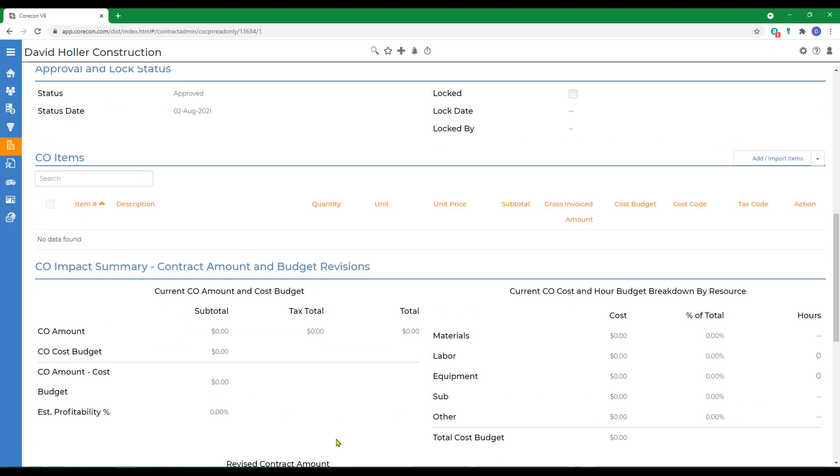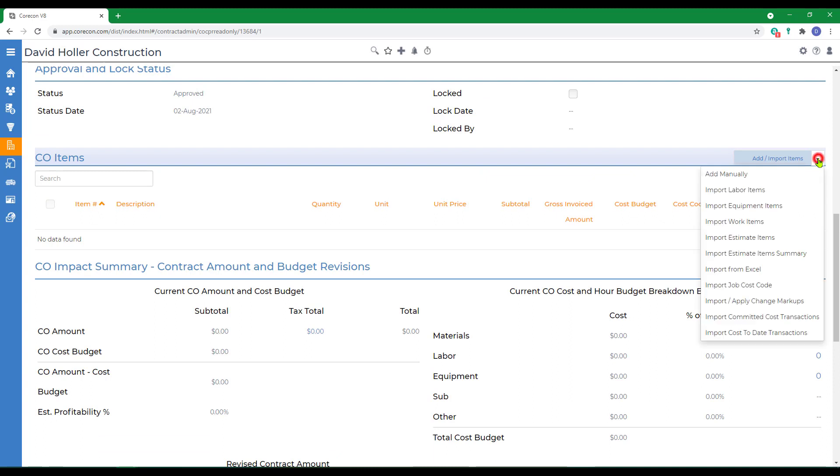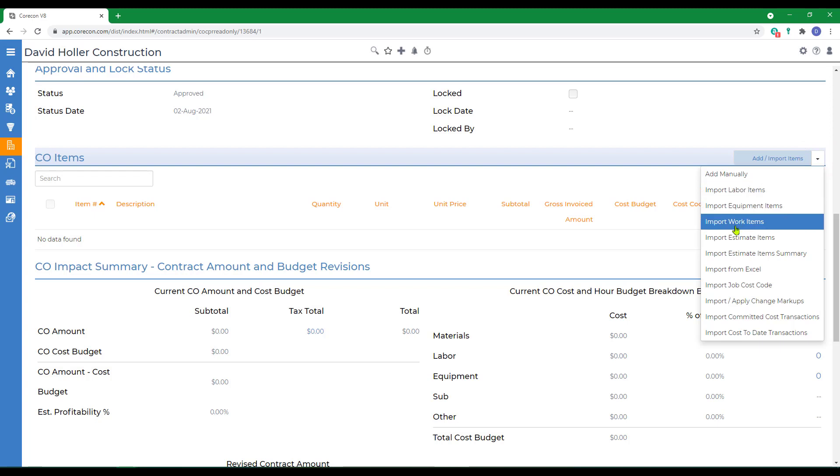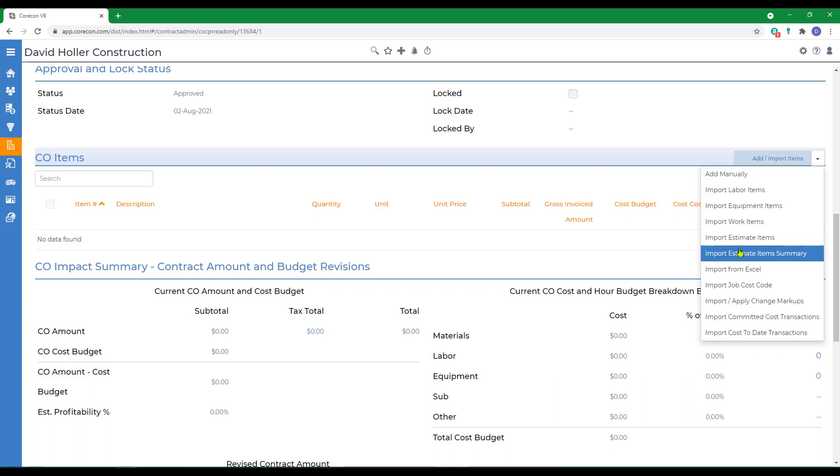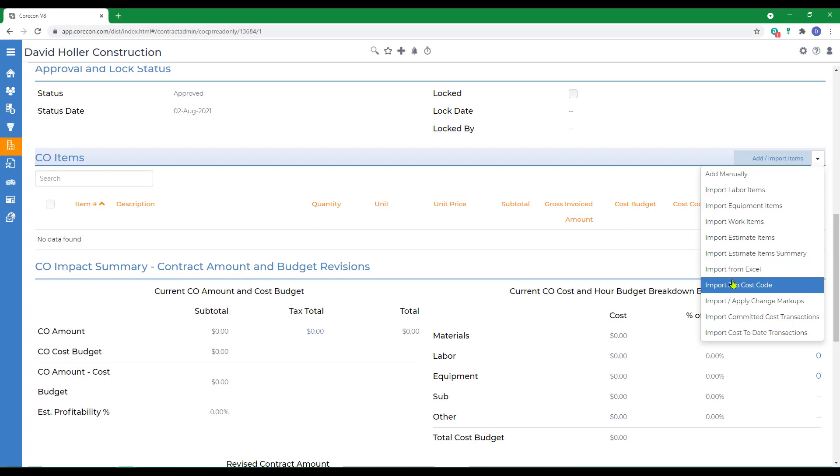There's another section, though, we want to fill in, and that is the Change Order Items. When I click Add Import, notice you can add manually. You can import items from your cost database, from an existing estimate, from Excel, from job cost codes, and a change order can be a cost plus type, and there's provisions for that on the menu as well.